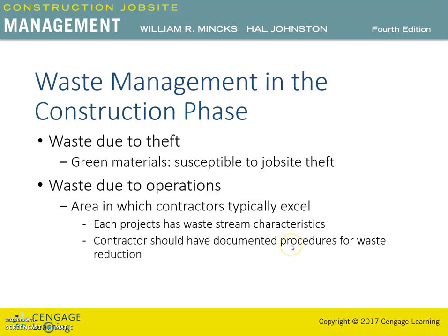You should have documented procedures for waste reduction and provide records of the waste management on the project. The storage practices should be reviewed for every project and should be pre-planned. Storage for specialty contractor material also needs to be considered in this plan.